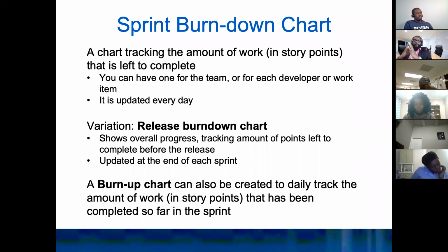Okay. So usually the product owner in advance decides on the release dates. So they know upfront when they're going to be releasing any product increment in production, right? I was telling you the other day that some companies are going monthly, they're releasing in production monthly. Some people are going quarterly, so every 3 months. So let's say your release is every 3 months, and your sprint is 2 weeks. That means that you have approximately 6 sprints before release, right?